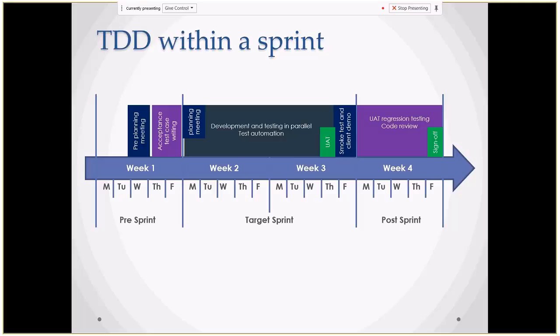Yes. So the defect found in UAT will be added to the backlog. Yes, the product backlog. Then the product owner and Scrum Master have to prioritize it. So if it is a low defect, the chances of getting that low defect fixed are very low.